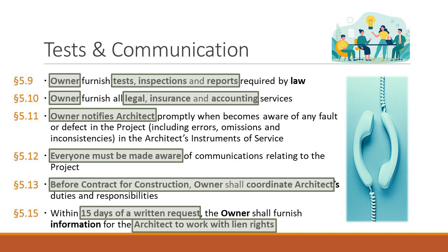5.9. Owner shall furnish test inspections and reports required by law. It talks about mechanical, chemical tests, and so forth. So if there's going to be certain types of materials being put in, or if there are hazardous materials found in the soil after you do your soil borings, and it turns out there's arsenic in it or some other type of chemical, the owner needs to provide that information on the inspections and reports.